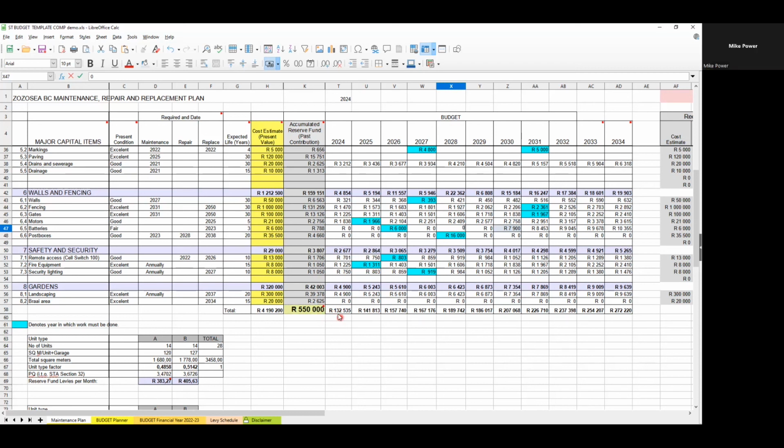If I can just come in there, Tinus. Yes, I agree with you 100%. The thing that they had, I forget what it was, 15% or 25%. That was when the regulations first came in, 2016, or in fact January 2017. That was only a makeshift thing until you got your 10-year plan up and running. Once you got it up and running, you've obviously got to work with your actual estimates. 100%. Yes. Okay.